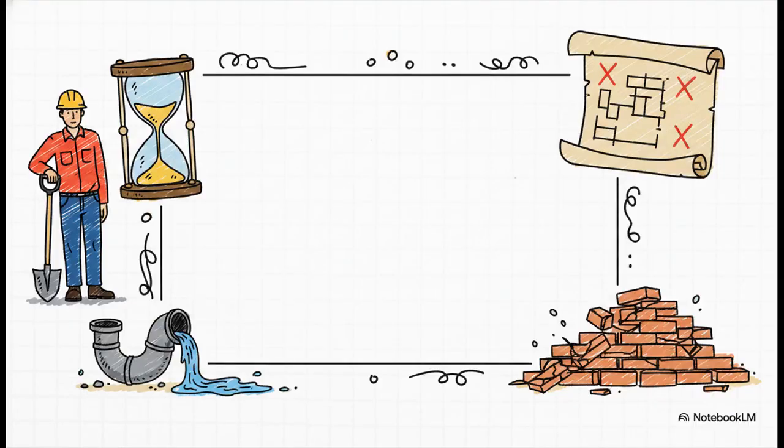To really appreciate the solution we're talking about today, we first have to honestly assess our starting point. Let's be real. Most project life cycles in architecture, engineering, and construction start in a terrain that is frankly filled with persistent, hidden problems. Problems we've just kind of grown accustomed to working around, right? At the core of this are what we call non-value-adding activities, or NVAA for short. Research going all the way back to Koskela in 1992 highlights that these are the completely unnecessary tasks and material losses within a project. I'm talking about crews just standing around waiting to start, the heavy costs of poor quality, rework, which is a huge one, and unnecessary transport across a massive job site.